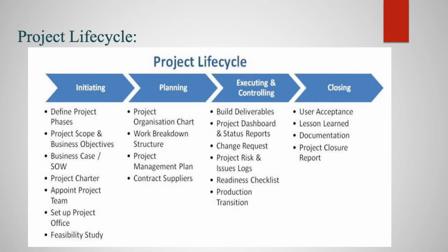So, the project life cycle. Let's have a look at the project life cycle. Initiating, phase one, is defining the project. First you have to define the project, what you are trying to do in this project. Then the project scope and business objective, and then you have to write the business case, and then the project charter, and so on.